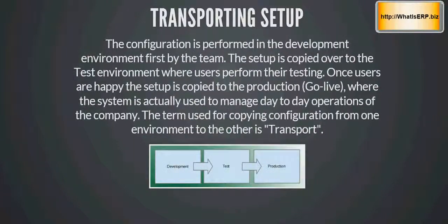You perform setup in an environment and you can move the setup from one environment to the other, and the moving of setup is called transporting the setup. So a functional consultant would go in, and after getting the business requirements, he would perform the setup on a development environment, and he would perform some testings, and once he's happy, he's gonna let users do the testing on a test environment and a production environment where you can start using the system, and this would be called go